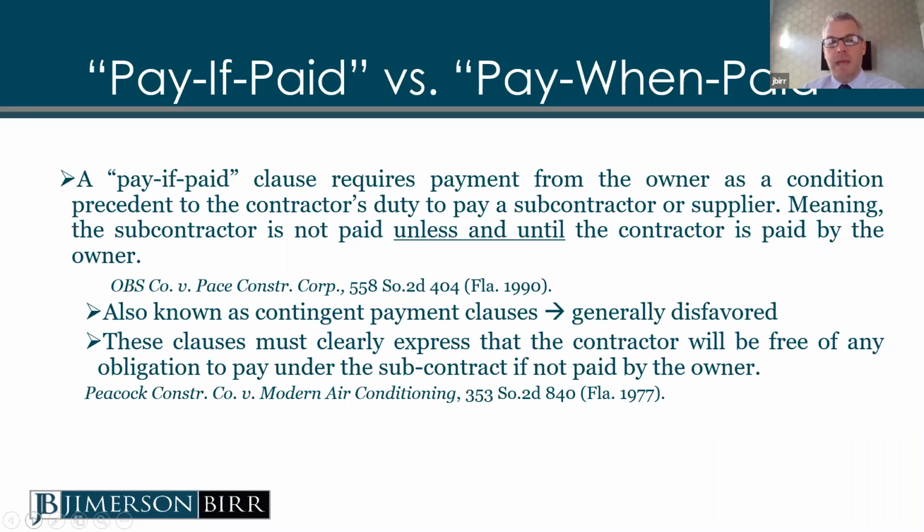So a pay if paid provision basically says, I don't have to pay you unless and until I get paid from the party who owes me money. That needs to be specific. It's a condition precedent to payment to you in that example, but that needs to be clearly written in the contract. It has to clearly express that the contractor will be free of any obligation to pay if not paid by the owner.